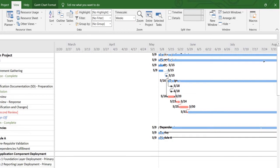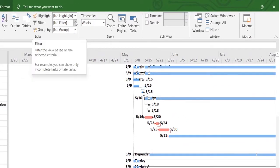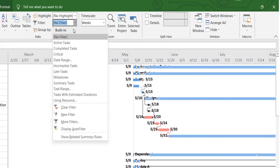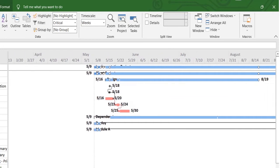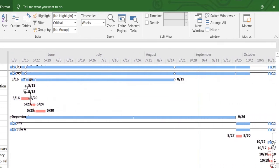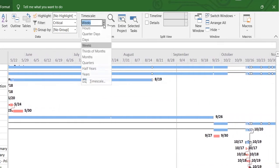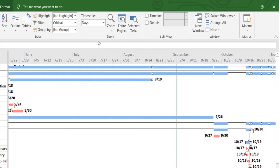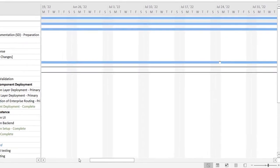The second thing I want to do is filter out all the rest of the tasks and see only the critical path of my project. I will head over here, select the filter, and select critical. Now over here you can see the critical path being shown for my project. Let me expand it a bit in days so it's easier to see.